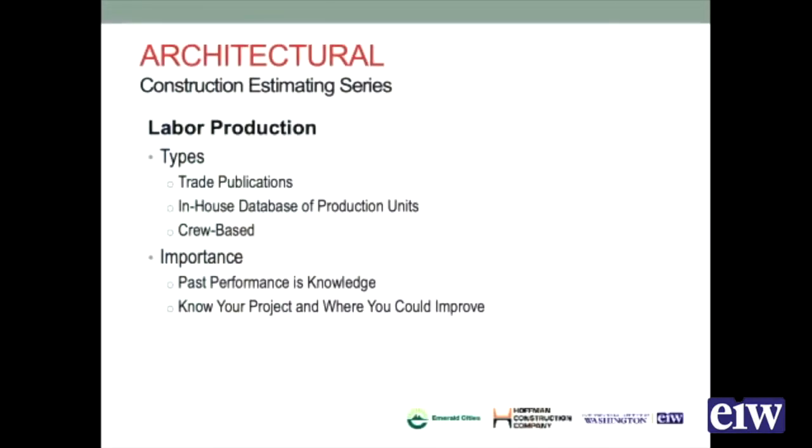Or do you need to make a quick course correction because you see your crews are behind and aren't meeting your productivity rate, and is there a reason why? You don't want to find that out at the end of the job. You want to find that out right as it's happening so you can fix the problem, right? So those are the productivity rates.